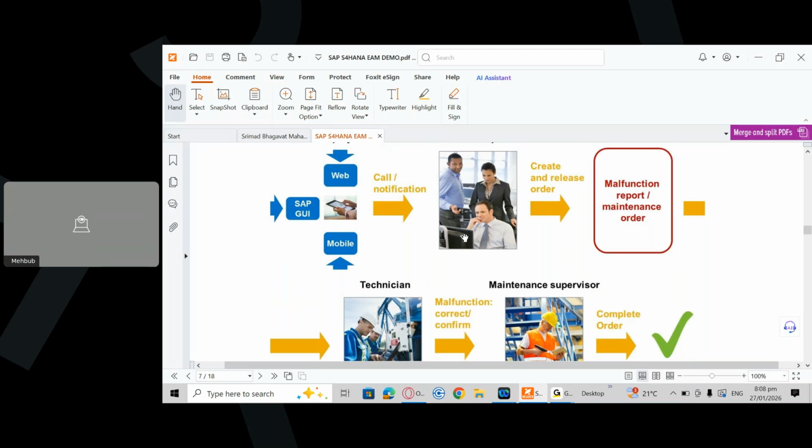So here, SAP has given one more provision, RSH, where we can do the scheduling and all, resource scheduling. But for that we need an additional license. In place of that we can use MRS to manage your resources if we are going to manage in detail. So here, based on your demand, it is going to transfer into the MRS planning board, and there you will fetch all the resources from the HR and assign them to that demand. That is the place where it is going to integrate.